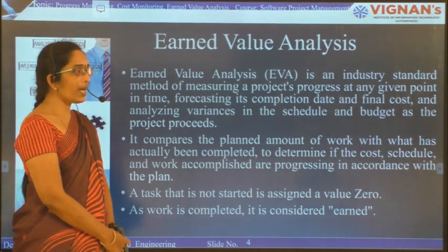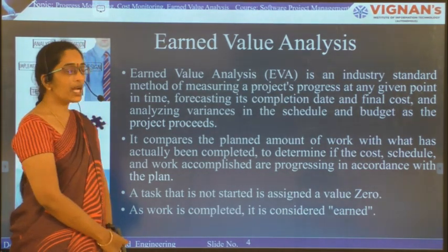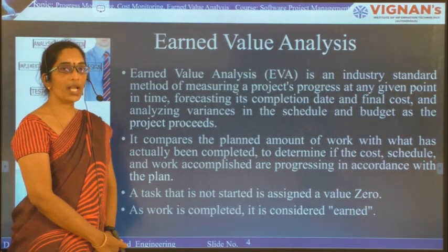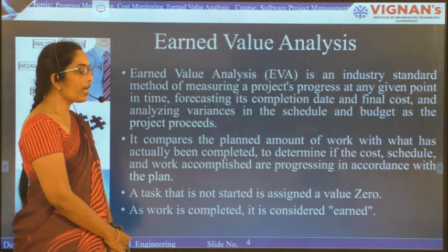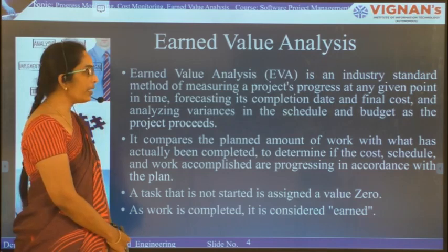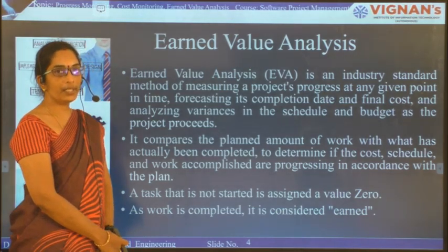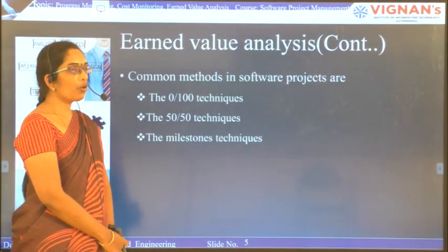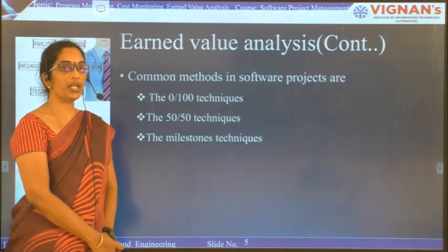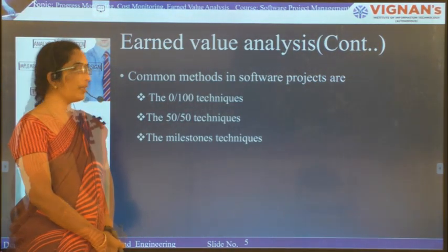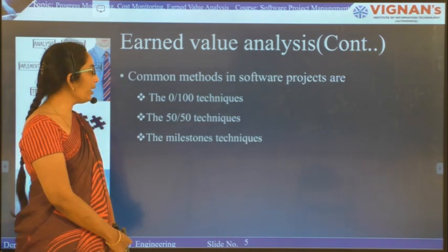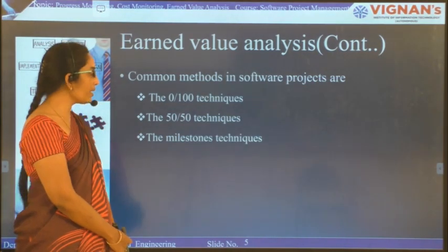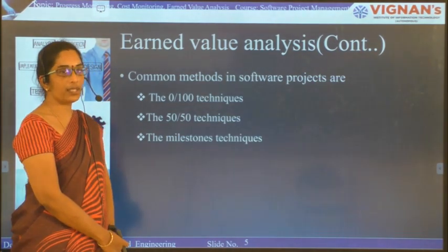In earned value analysis, a task that is not started is assigned a value of 0, and as work is completed, it is considered to be earned. The common methods used in earned value analysis are the 0/100 technique, the 50/50 technique, and the milestones technique.